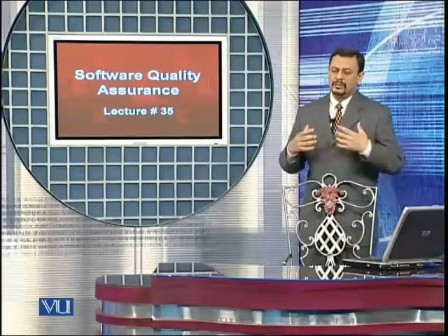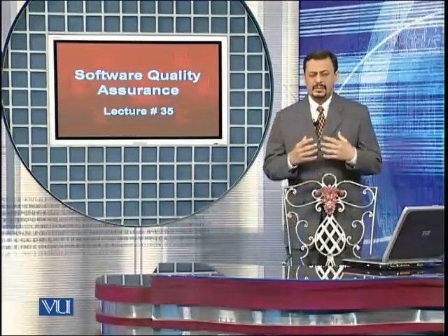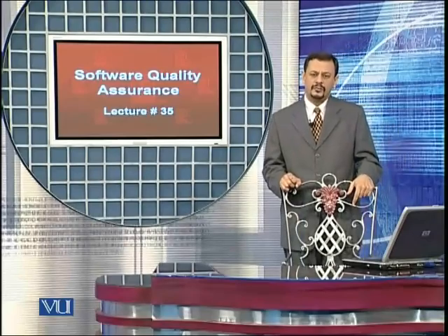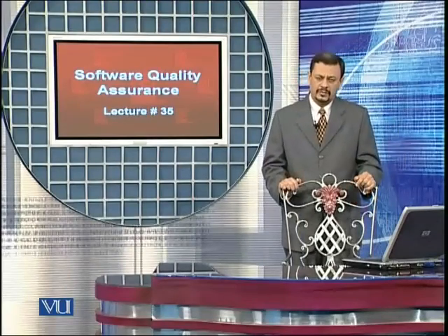When it was created, who created it, when was it updated, when was it modified, where was the change request coming from, who approved it, when was it approved, and all of these things are available through the accounting status reports. So again here I'm emphasizing that accounting and reporting functions of SCM are improving the visibility of configuration items.